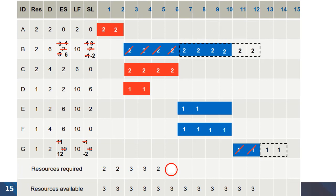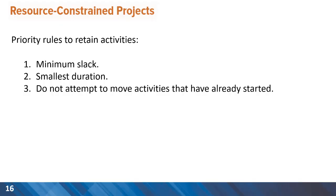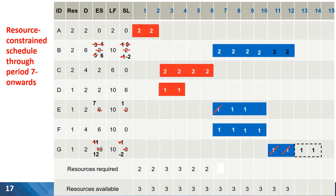For the sixth time period, again the only option is to move activity B, and it further delays the completion of the project to 14 days. Now the slack for both activity B and G are negative 2. Revisiting priority rules, we can decide on the next move. For solving the resource leveling problem in the seventh period, the required number of resources is 4 and we need to reduce it to 3. The only activity with slack is E, and based on the priority rule we will move this activity and delay the early start date to 7. The slack is reduced to 1 with no delay for project completion yet.